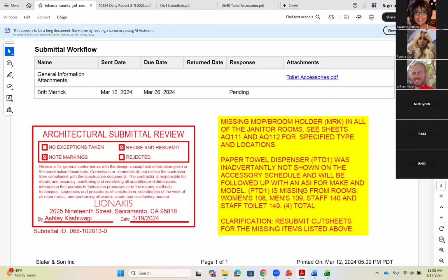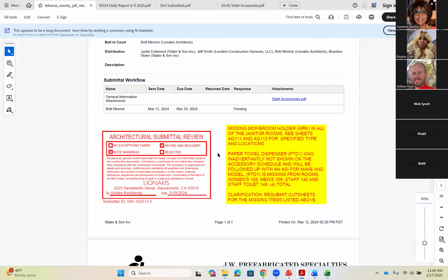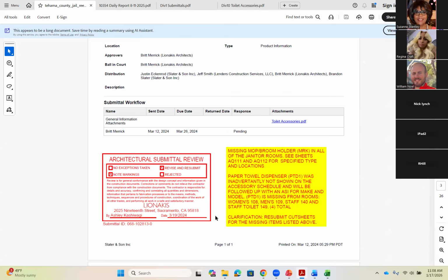So if I didn't read that correctly and I just provided a new submittal for those paper towel dispensers and then they got approved, technically you're still not contracted to it, but a lot of general contractors may look at it and say, well, hey, you provided this submittal, said you were going to provide this, and you're going to get in a battle now when you ask them for the cost of those extra four paper towel dispensers. So it's best to read those comments, make sure you respond accordingly, and send a change order for that. Now, change orders is a whole other topic we'll get into later, but just something to always keep an eye out for as to why you should review these submittals correctly.